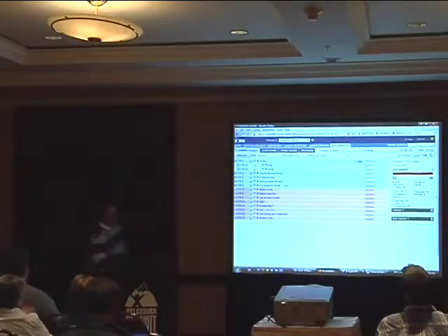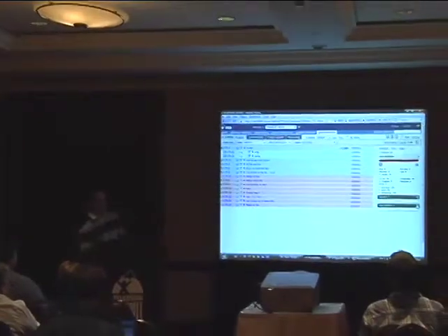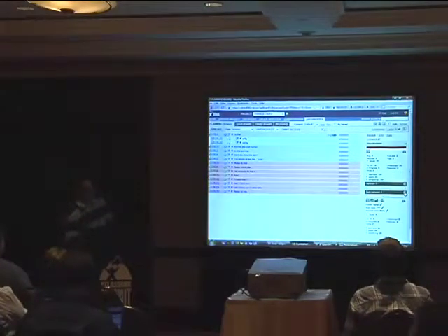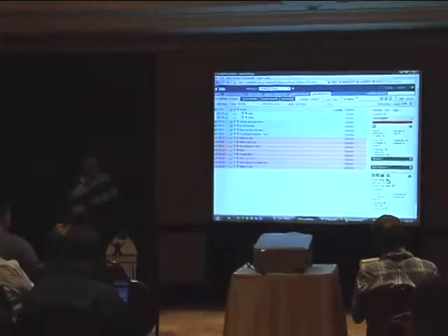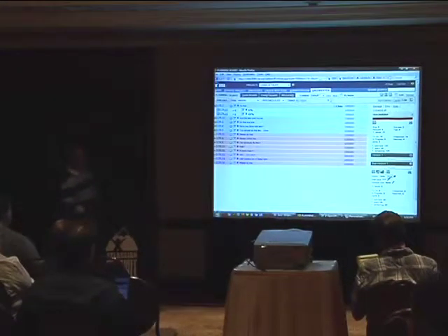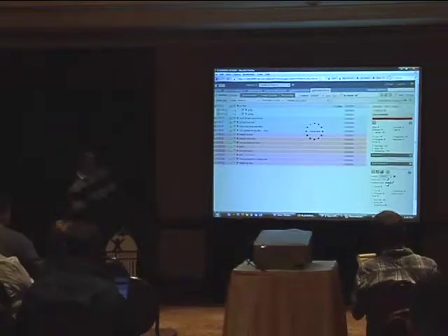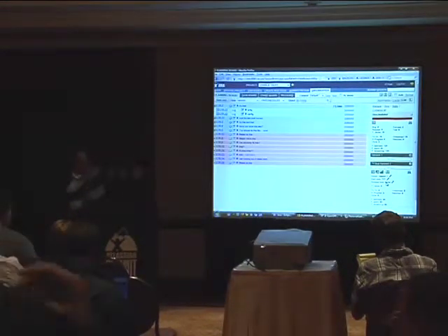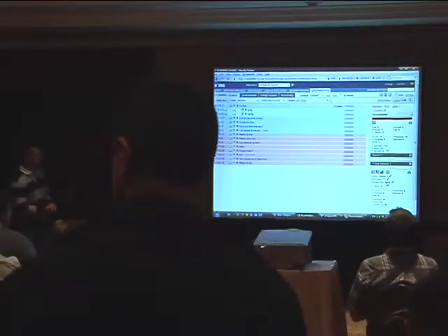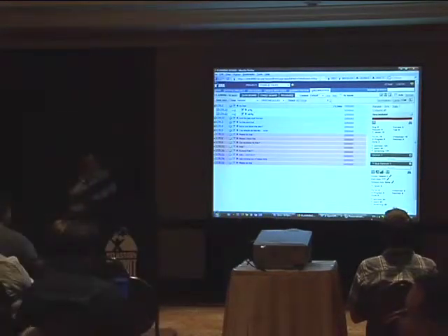So here, what we did in GreenHopper is you can actually nest some versions within other versions. For instance, this subversion 1, you can nest it to the other version, which is version 1, right up there. So it's like a master-slave relation. Here you can say, okay, my subversion 1 is a subversion of version 1. There you go. Now you see there's some kind of hierarchy that's being designed.